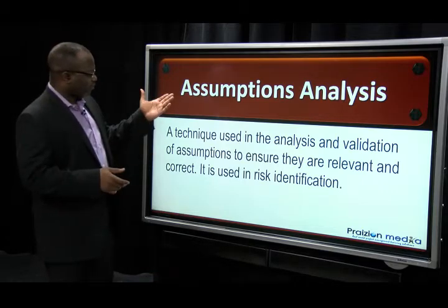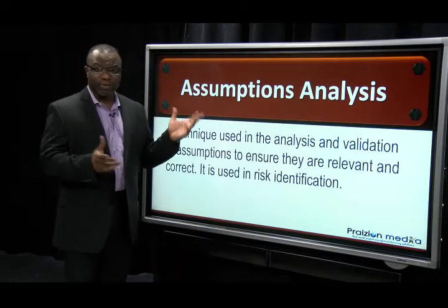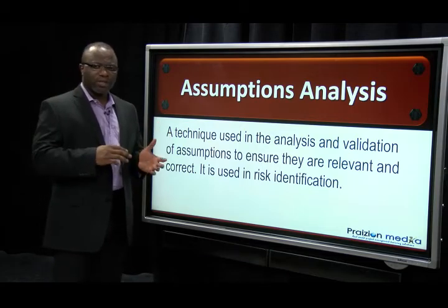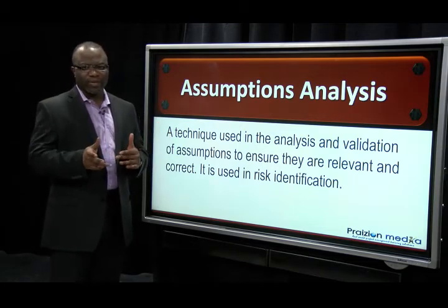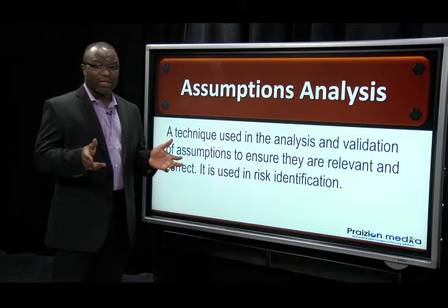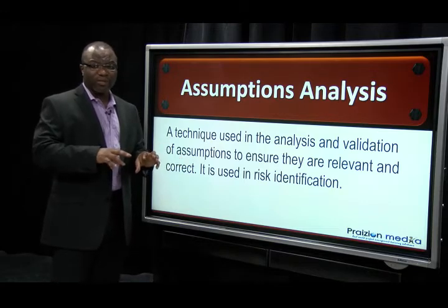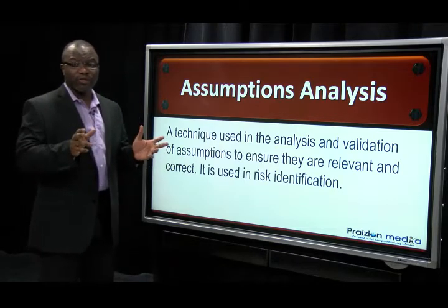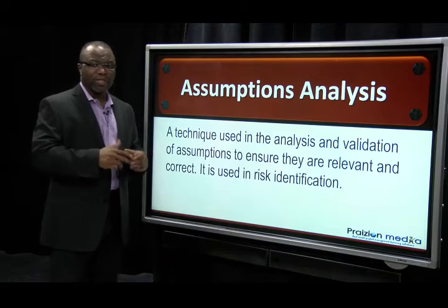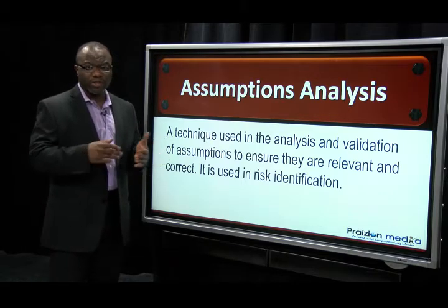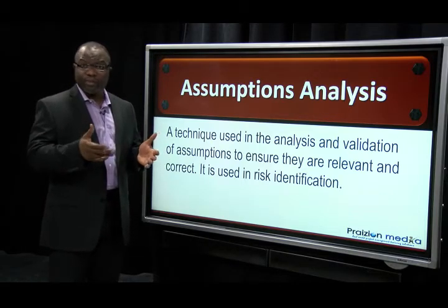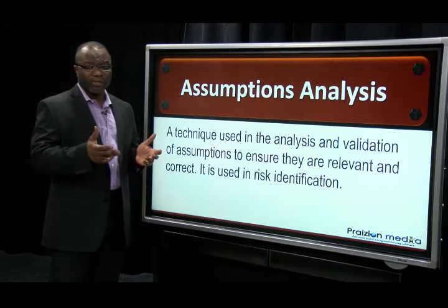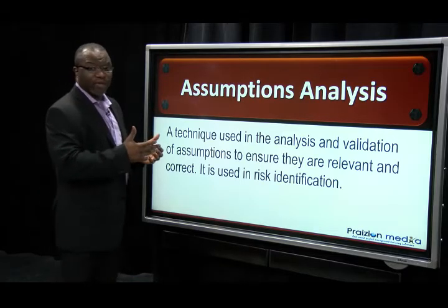But what happens if you carry out an analysis of those assumptions and you discover that they are not exactly accurate? It might already be too late. At that point, your best bet may be to find risks associated with those assumptions. Perhaps you may be able to modify the assumptions, but if not, you're faced with identifying the risks and managing them.